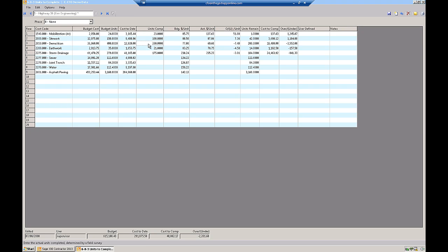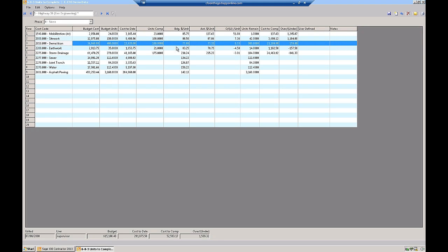And I'm going to ask the guy in the field, how many of these do I have done? And at the end of the week, he puts on his time card, I've got 180 of those. I can now tell you that I budgeted $77 a unit. And wow, this job I'm actually doing it for the budget. I'm at $77.33. I'm going to miss the budget by a whopping $159, which is a good thing, right?